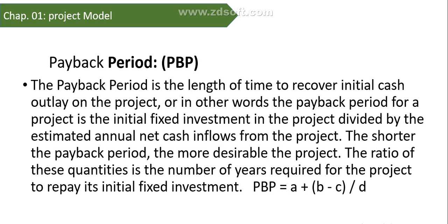If our $280,000 project were to bring in $20,000 per year once it is completed, the total payback period would be 14 years. Means if each year we receive $20,000, after 14 years we will recover our initial investment.